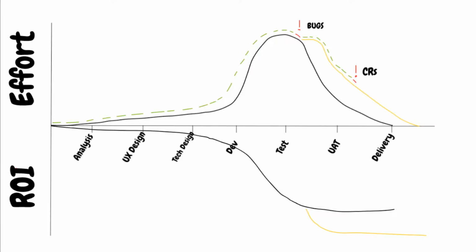So what do we get? Change requests, which means once again, we have to go back to the customer and renegotiate a deadline. So we have to adjust the delivery date. And what does that mean? Once again, it means that our cost for the entire project once again increases. If we're lucky, things might go smoothly from there, but my money's on the fact that you'll probably go through the same bugs issues and second phase change request issues as we did the first time round.